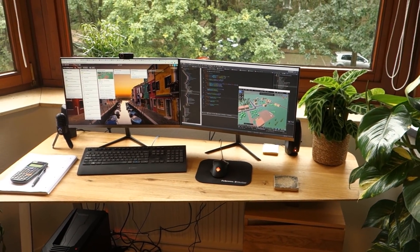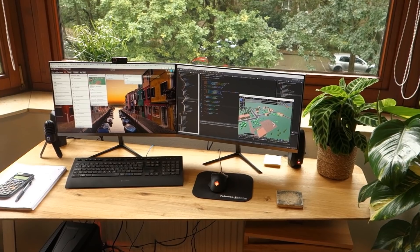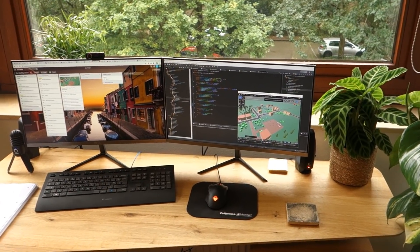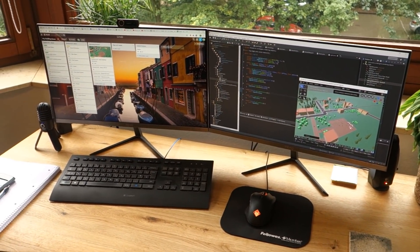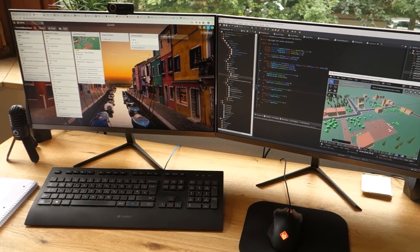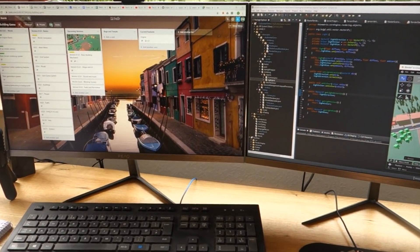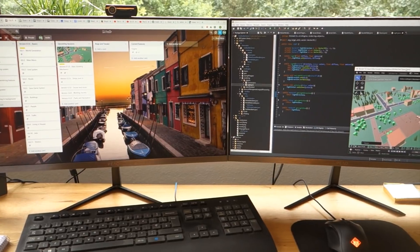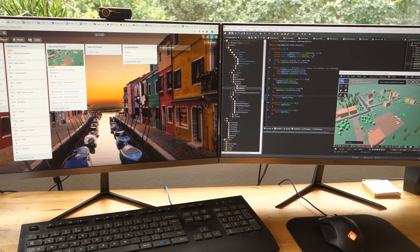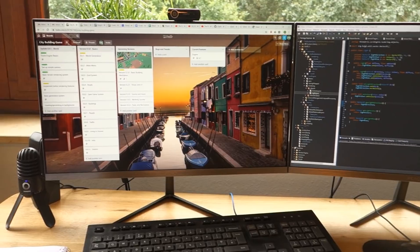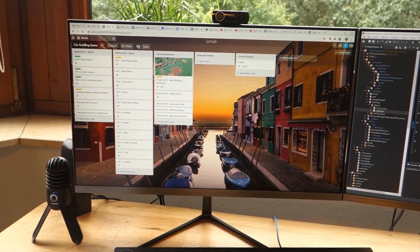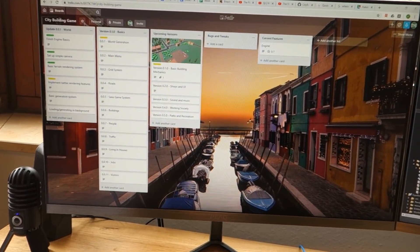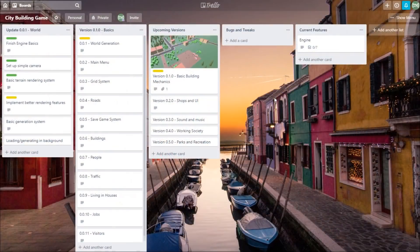Before I go any further I just want to talk quickly about how I'm going to structure the development of this project, because for Aquilinox I had absolutely no plan. I just had an idea for the finished version of the game, and I just set off blindly towards it. This time it's going to be a little bit different. I'm going to work in small iterations, and after every iteration I want to basically have a finished working playable version of the game that I can then build upon in the next iteration.